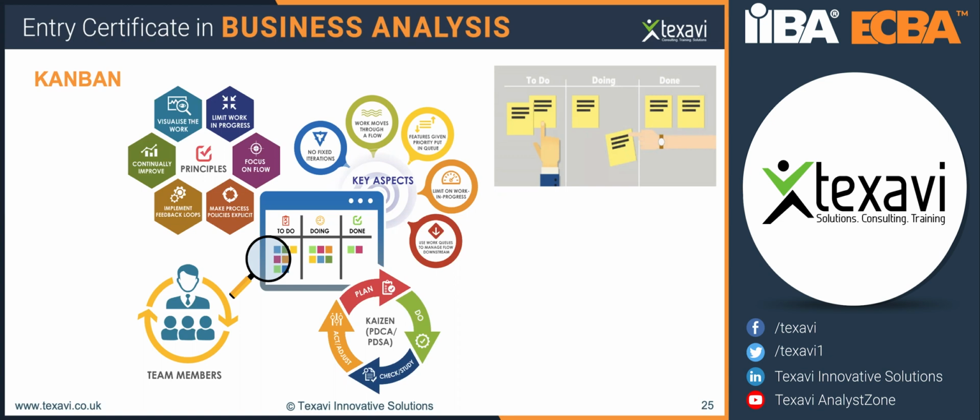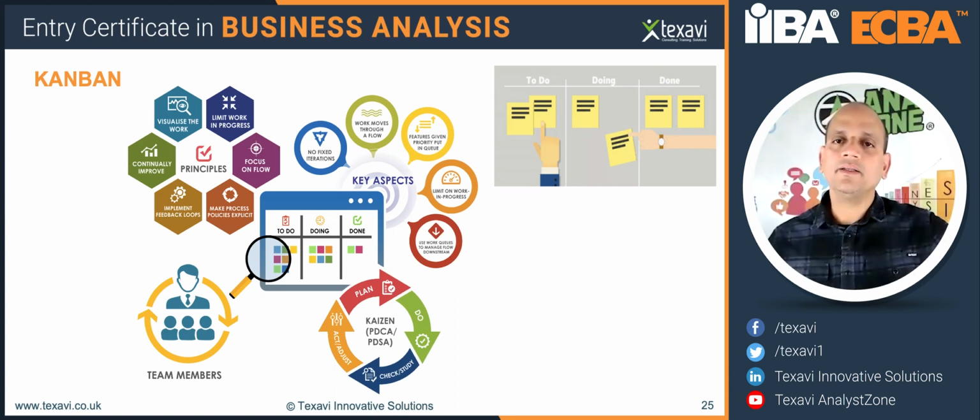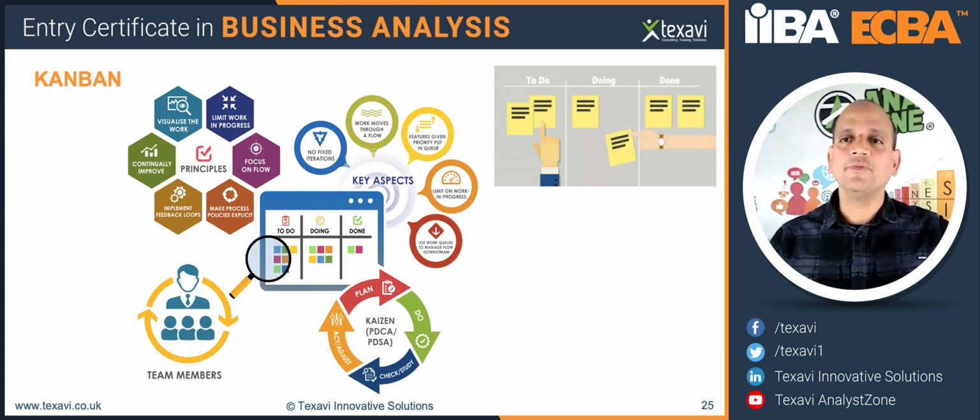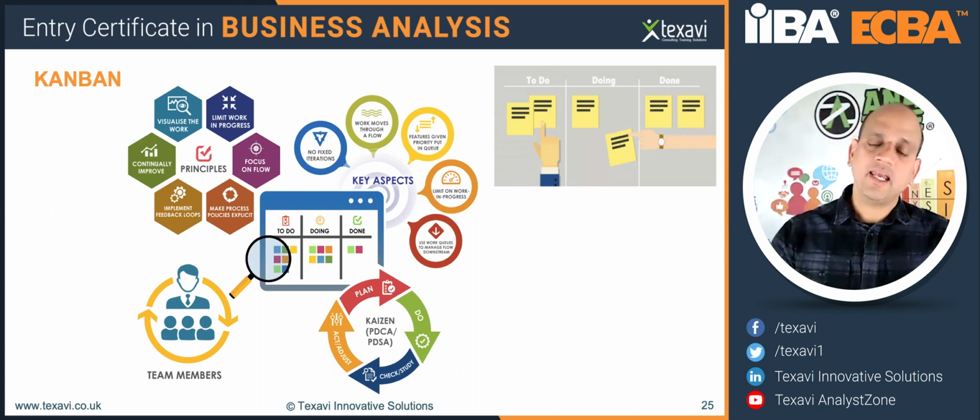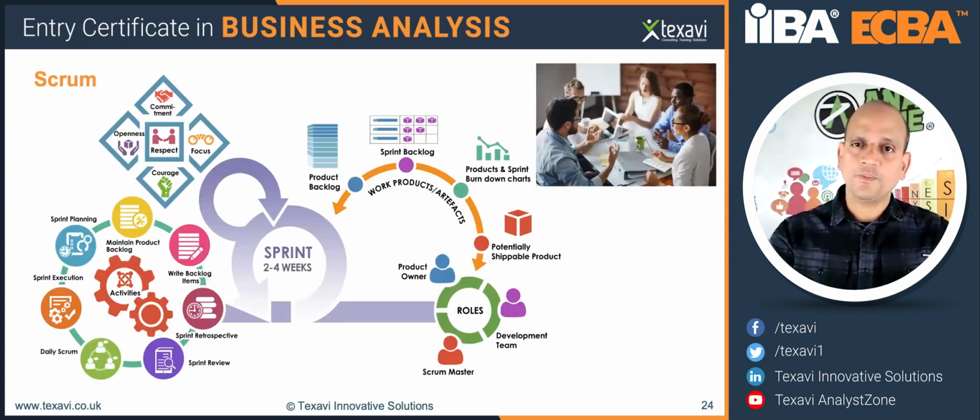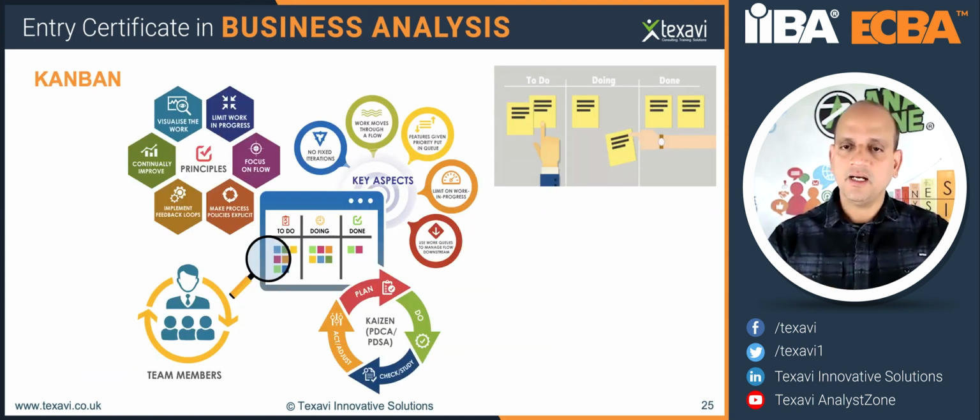Or if you've already got a product, but that product is deployed already, and you're getting feedback from the customers and raising tickets to improve the product. So you create a ticket. If somebody says, I want to be able to change the colors on the screen, that's a ticket. That's the functionality that you need to work on. So Scrum is for development of a new product, or something that is like a product. Whereas here, this is for maintaining a product. Kanban could be a beautiful tool. If you're maintaining it, supporting it, it's already developed.